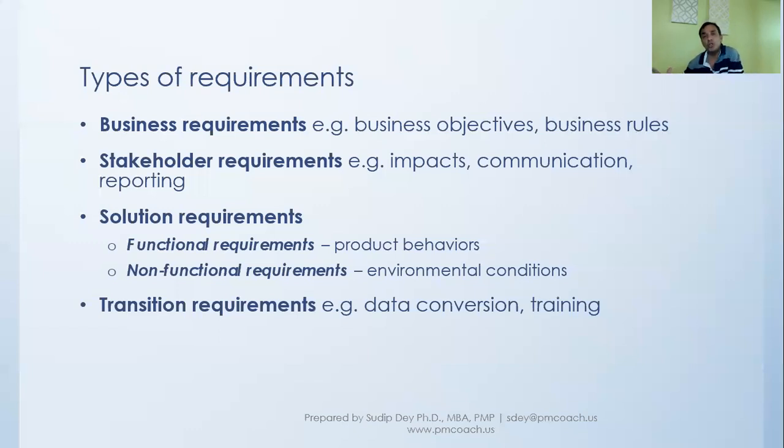But when you put in the system, they would want to move forward seamlessly. They don't want to lose all the work that they have done before. So there might be a requirement that you have to take the old data, or data in their old system or old process, and bring it into your product so that they can move forward without any problem, without losing anything they've done before. So this is a data conversion project.